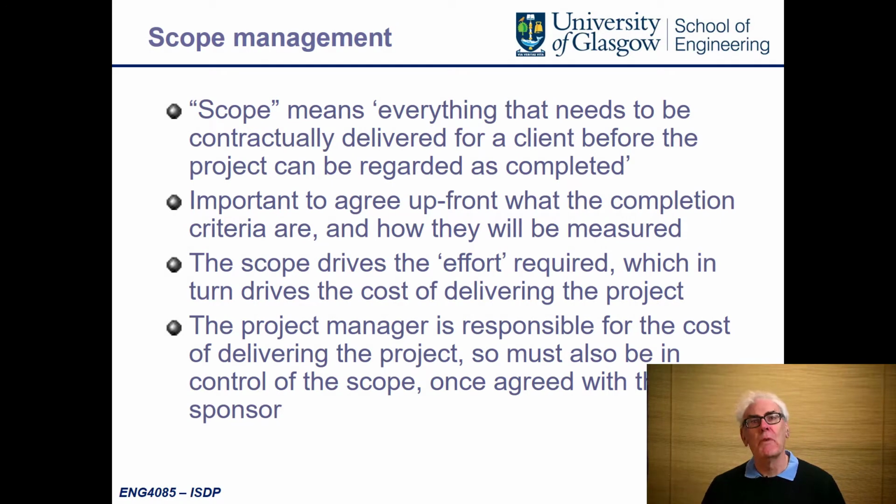And as we discussed, scope is everything that you have contractually agreed with the client before they will define it as complete. We don't want any projects that you lob over the wall and assume that someone else will look after. As a project manager, as a project team, it's imperative that you make sure that what you deliver is exactly what the customer wanted and you meet and agree what the acceptance criteria are with the customer. Agree what completion means and also how it will be delivered. If you're producing a piece of electronics, what is the performance, what is the specification for that piece of electronics before the customer will be happy.